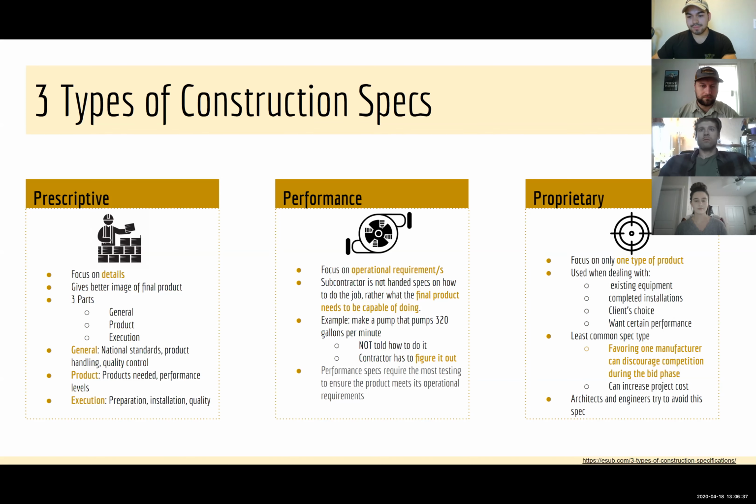It is the least common spec because it could favor one manufacturer and it can discourage competition during the bid phase. And it can also increase project cost. Architects and engineers try to avoid this spec.